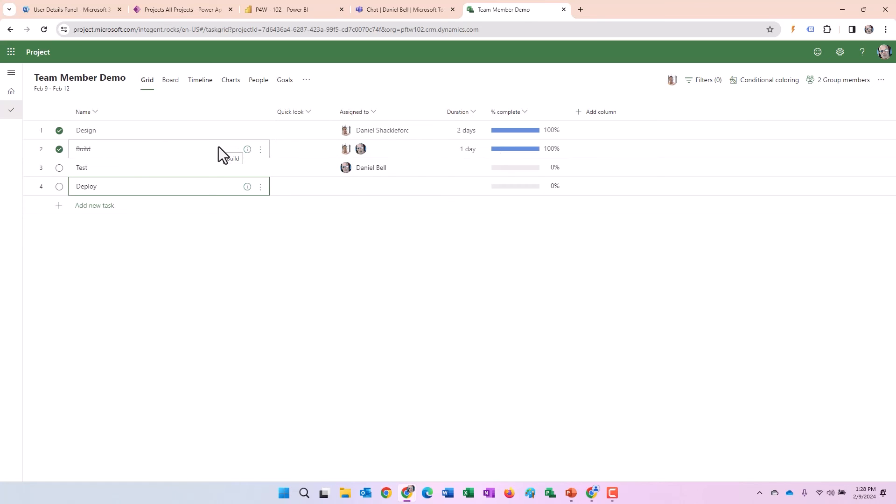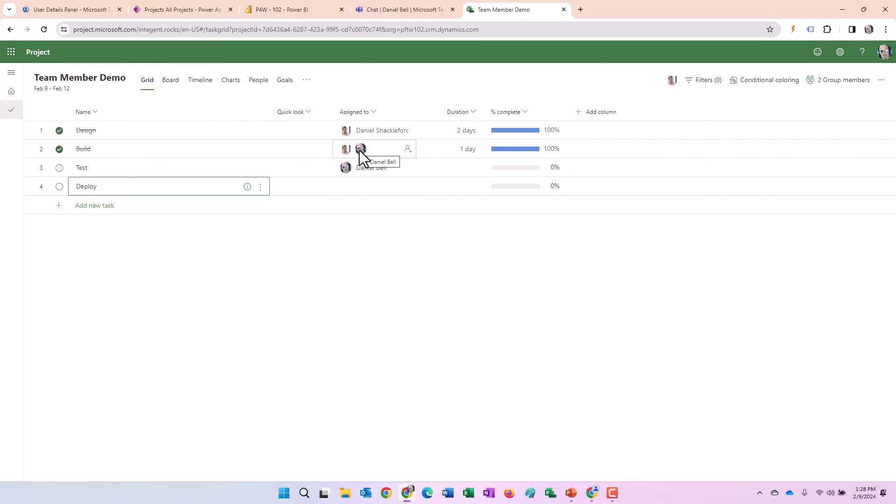Therefore, when you as the project manager are building these projects, if it's important for you to know that Dan Shackelford completed his work differentiated from Dan Bell, you're going to want to consider the way you build your tasks. So you're going to want to have two different tasks and then you'll assign one resource to each task so you can track each resource's specific progress on their tasks.